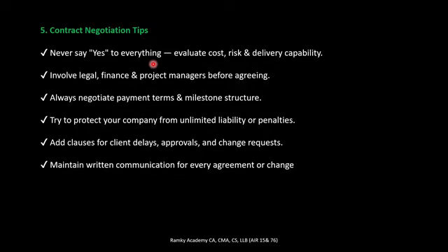Sometimes it goes for negotiations in order to finalize the contract, and it involves legal, finance, and the project manager before agreeing. Delivery has to agree to the delivery clauses. Finance has to agree to the payment terms, liability clause, and warranty clauses. The risks involved here, and audit clauses and step-in clauses, are all very important, because each and every clause has an inherent risk, and every person has to review the clauses in depth because these clauses protect your interest in the future.